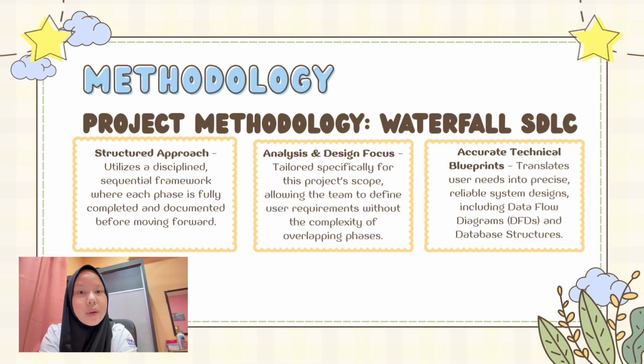Next, I will brief you about the methodology for our clinic management system. We adopted a waterfall model for three main reasons. The first reason is for the structure. The second one is for project fit. Since our project is focused strictly on system analysis and design, it allows us to lock down the requirements without overlapping the deliverable phases. Third is accurate blueprints. It helps us translate clinic workflows into precise data flow diagrams and database structure.